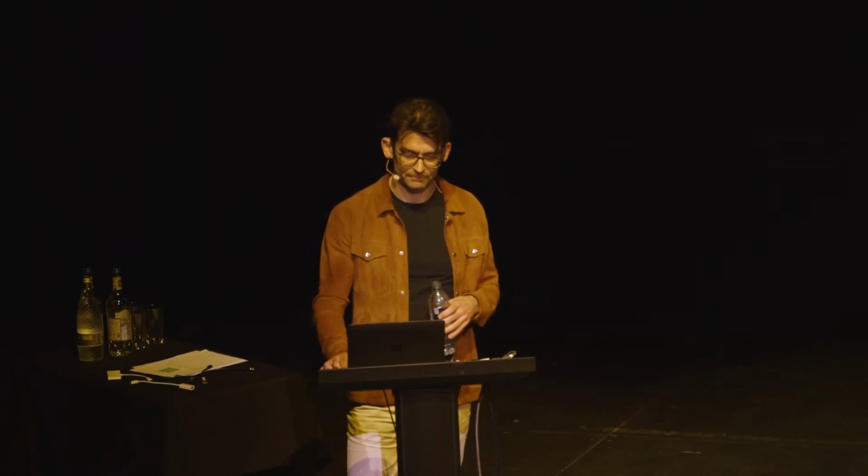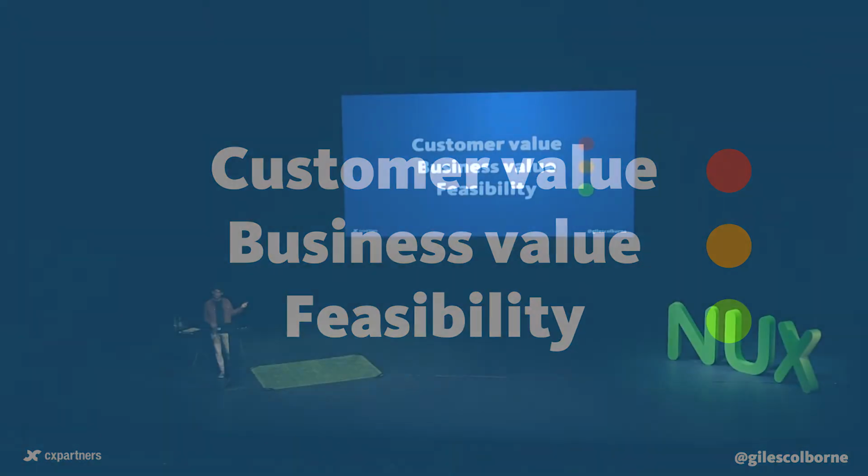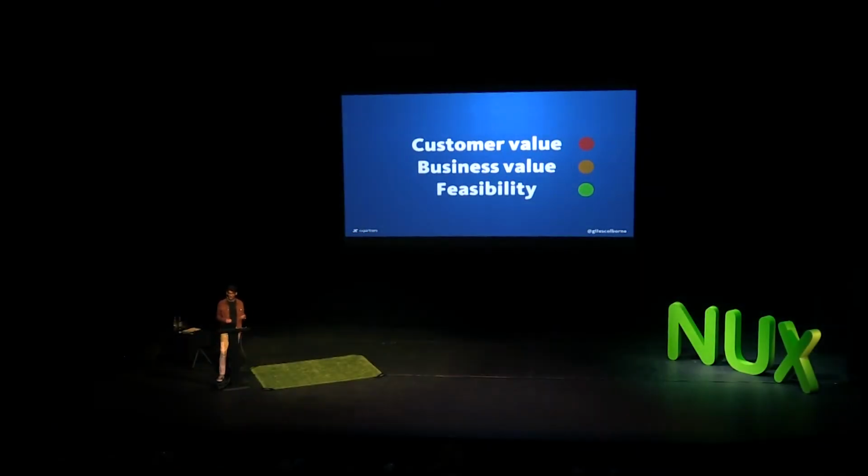A good business model is one where the customer and the business both get value, and the business is playing to its strengths, or learning something learnable. So we rated the themes on all 3 factors. And we used a very simple scoring exercise based on the evidence we'd uncovered in discovery. Those are the 3 questions you'd ask in a business case. Would people want this? How would we recoup our investment? Can we fix it? But we only had a little knowledge. We had a shallow, broad knowledge from the discovery phase. So instead of calculating return on investment, we just gave things a rating: red, amber, green.